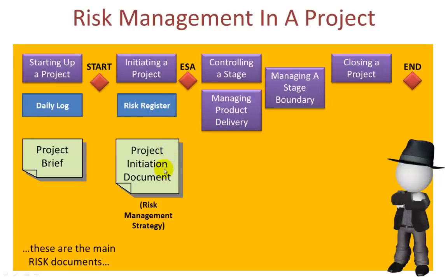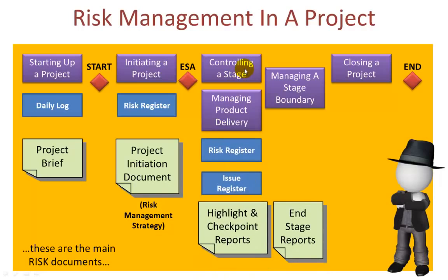The project initiation documentation is created and in particular the risk management strategy document, which is the approach you take to managing risks. During a typical delivery stage, the Controlling a Stage and Managing Product Delivery processes work together — the project manager in Controlling a Stage and the team manager and specialist team members in Managing Product Delivery. Risk can arise at any point and can change during the life of a project, so the risk register would need to be updated if either of those situations arise. Issues can be raised and these may cause some impact to the risks themselves, and any particular risk may cause a new issue to be raised. The main products during a stage are the highlight and checkpoint reports, which contain the status of any particular risks.